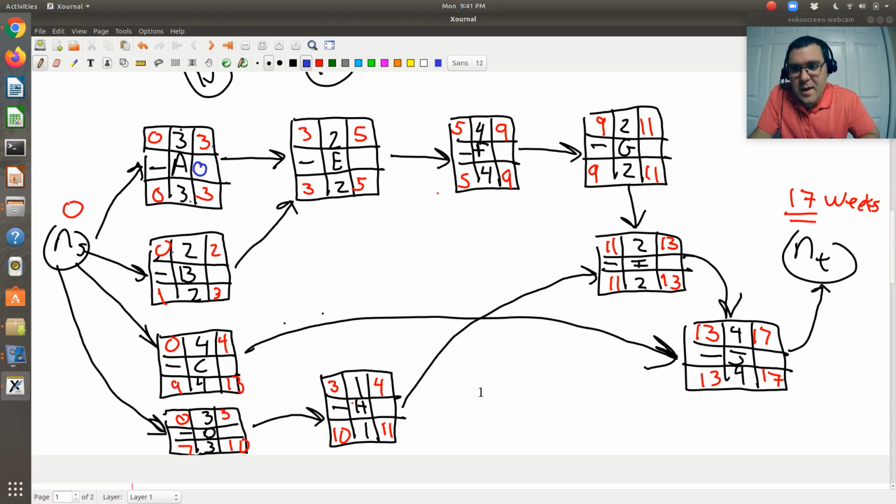When I look at B, the earliest possible starting time and latest possible starting time differ by a week, right? And you see the finishing times do as well. So this means I have a float of 1 week. As long as this activity begins between week 0 and week 1, I have this 1 week window in which I can begin this activity, for which the project will still be completed on time.